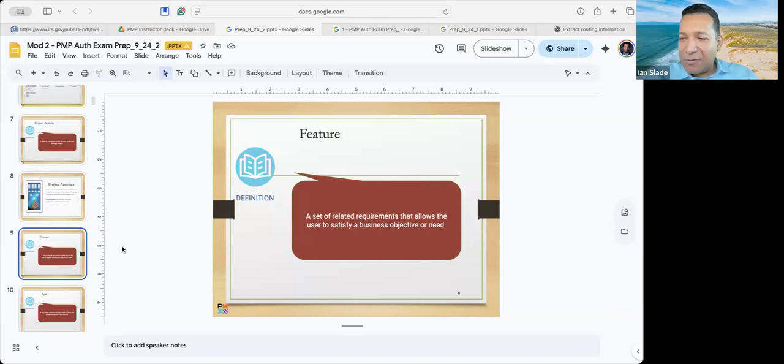A work package is usually tied to a deliverable. So the work package would be attached brake pads, right? So the deliverable would be, you know, now you have an attached brake pad. The step by step of using a screwdriver to put in the 4 screws, you wouldn't go to that level in terms of tracking, but you would have it as activities that you would follow, but not necessarily. So you, the technician, but not necessarily the project manager.